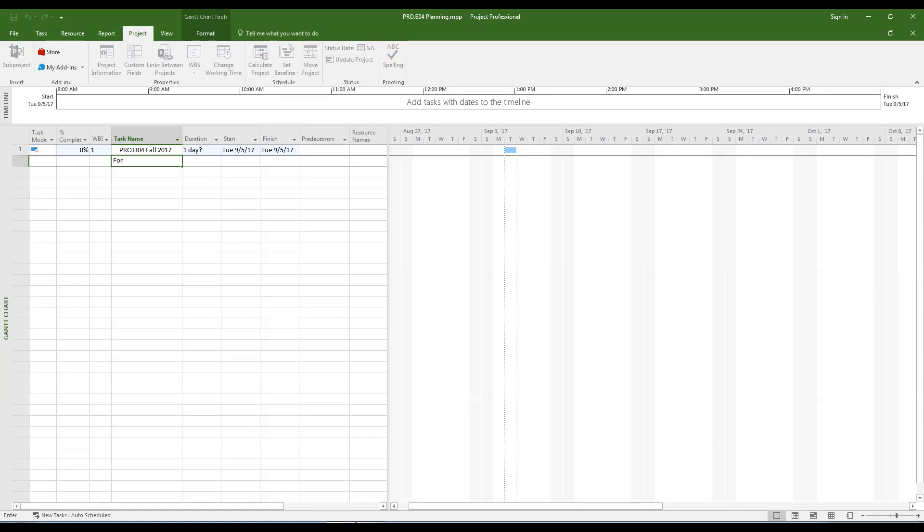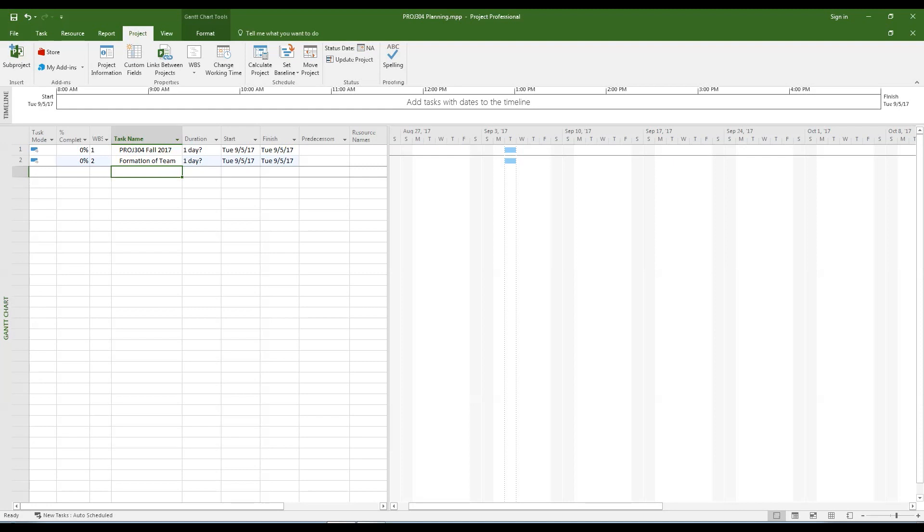Now enter the name of the first subtask that will need to be completed in the second row. This layer of subtask is often still generic in nature and acts as a second layer summary task. These are broken down into more detailed subtasks.